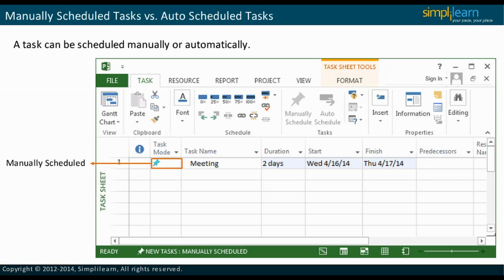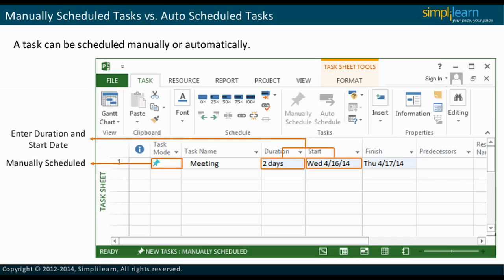In the case of manually scheduled tasks, you need to enter the duration and start date of the task. The finish date is calculated according to the duration entered.